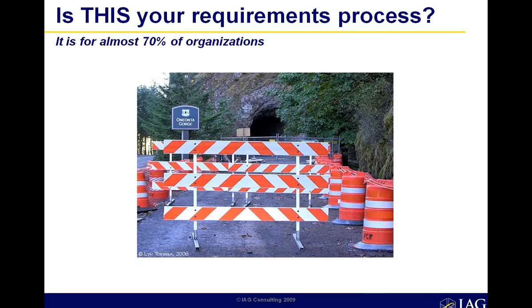On a $1 million opportunity like this, with IAG's approach, we would probably run the business requirements phase in something like 5 to 10 working days. I mean, we're really talking about a radical compression in the overall amount of time. And when I'm talking about business requirements, I'm talking about process flow defined, data flow defined, business rules defined, your structured statements of system capability defined, the first part of your overall data dictionary. All these other kinds of things done and complete.